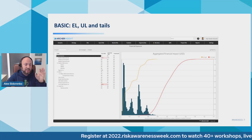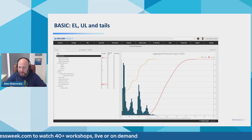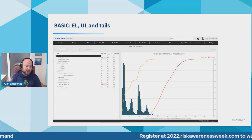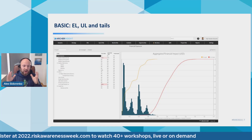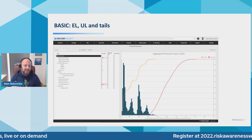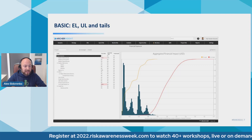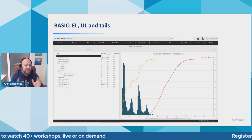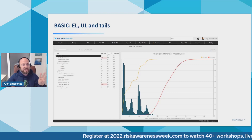This is what a loss exceedance curve looks like. The red one is the unmitigated one — basically your current risk exposure. Then the yellow one is where you start thinking: the overall current risk exposure is unacceptable, we need to do something about it — and you add different mitigations to see how the risk exposure changes. This loss exceedance curve, or risk profile, has three super important pieces of information.